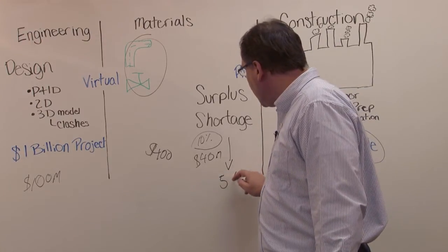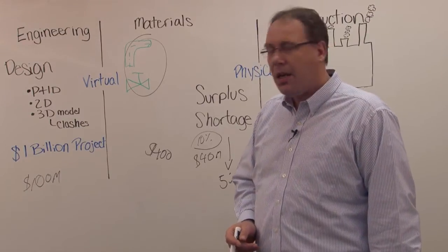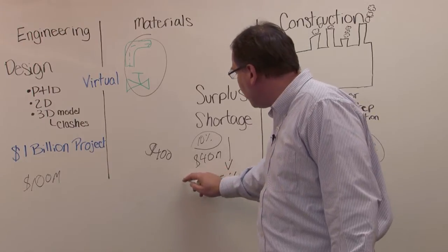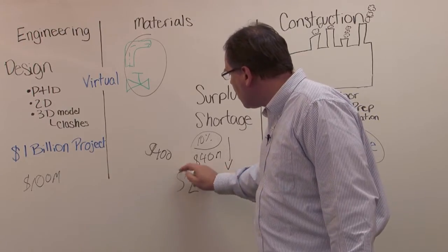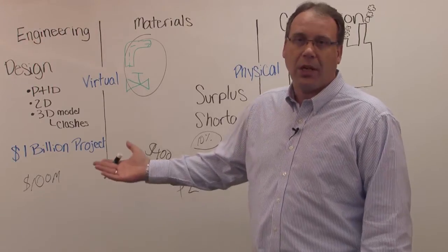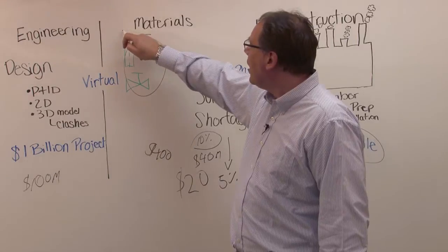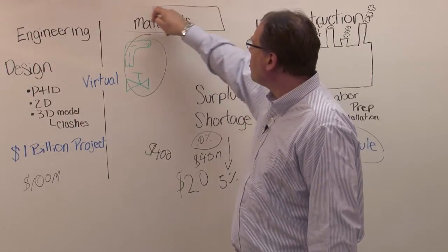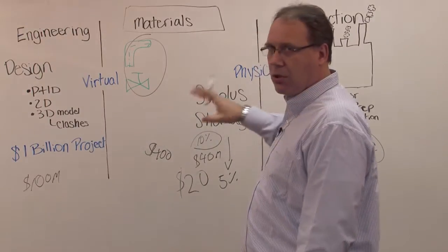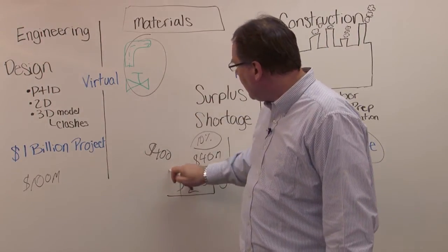What this means when you're able to reduce the surplus to 5%, you would have savings of 20 million for materials management in this project. And this is the reason why a lot of companies are introducing materials management solutions that are comparing the different quantities in different systems so they can achieve these savings in projects.